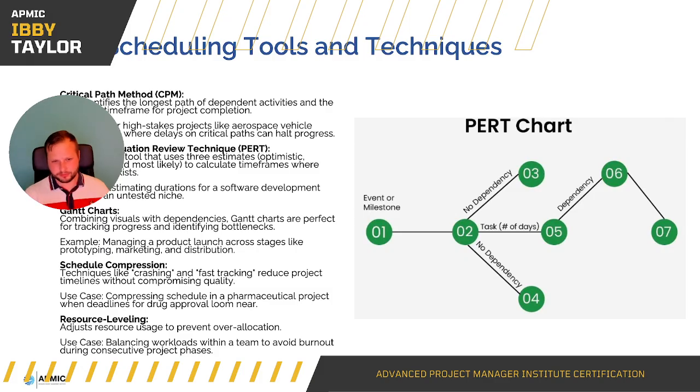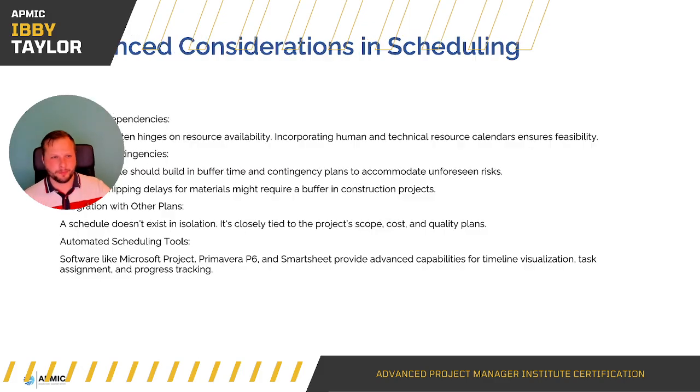All of a sudden, they've got 10 hours of work, but they only work an 8-hour day. They're over-allocated. So you then need to look, right, okay, I need to take 2 hours off this person. I need to move around the tasks in order to make sure that someone doesn't have more than they're physically, humanly capable of in any given day.